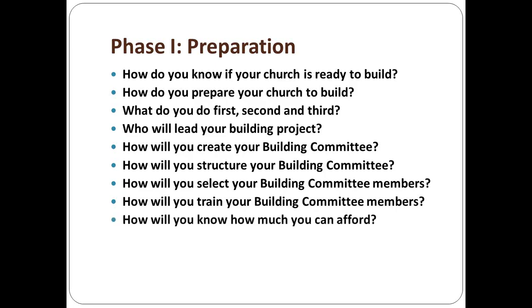Now, how will you know how much you can afford? Take what money you have on hand, how much you think you can raise, how much money you think you can borrow, and subtract what you owe, and that will give you the bandwidth of your financial capability. Your capacity to take on a project can be determined by that.